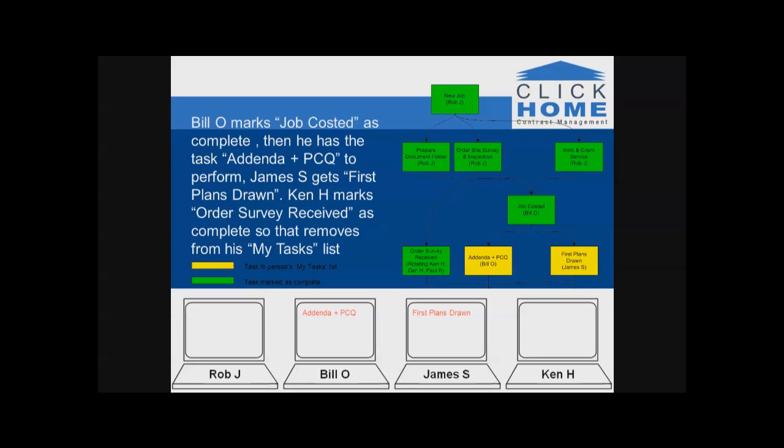And this is a central concept of pre-construction, and this is the reason why it reduces the management burden. So you don't have to do that finite management. The system will do it for you. So by completing something, it results in something being passed to someone else. And when designing your workflow, you need to take that into account, because you're asking yourself, what do I need to have done before I can do this task? Now, each task you add to your workflow, you're asking that question, and that dictates how you draw these lines, these precedents, we call them. Okay.